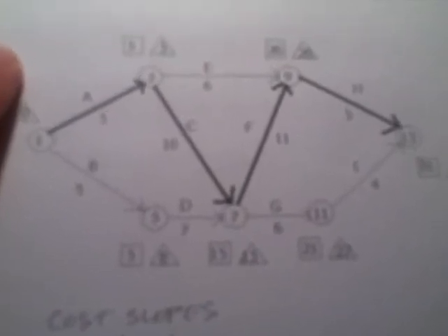The last thing we do is to evaluate the resource balance or manpower balance and any change we might be able to make. And I prefer to use a bar chart for this purpose, as you see here, and you can see in your notes. And on this bar chart, I've drawn the diagram in a flat graphical form. And I always draw the critical path first, as you see here in the dark lines going across the chart. And then I array the other non-critical activities around it, as you see I've done here. Immediately, you see the float time is very graphically demonstrated.